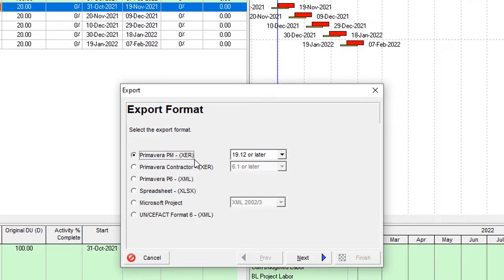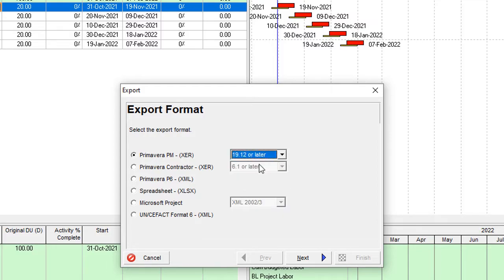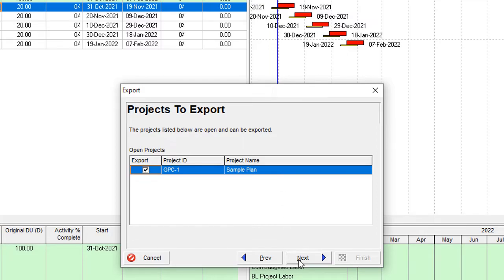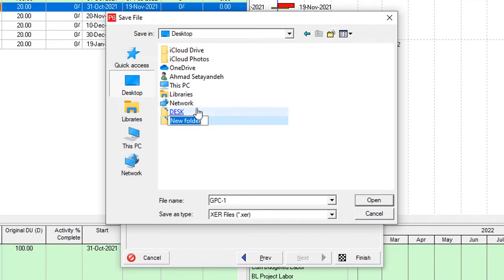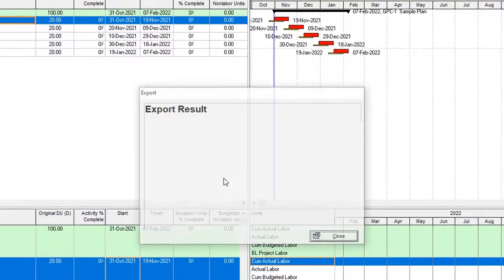The XER file is the official extension for Oracle. Over here you can select the version of your recipient file. I'll use version 19.12, then go to the project. You can export all the project, resource only, or role only. Over here you can select one or more projects if you have more than one already open, and select how many projects you want to export. The last item is referred to the export.